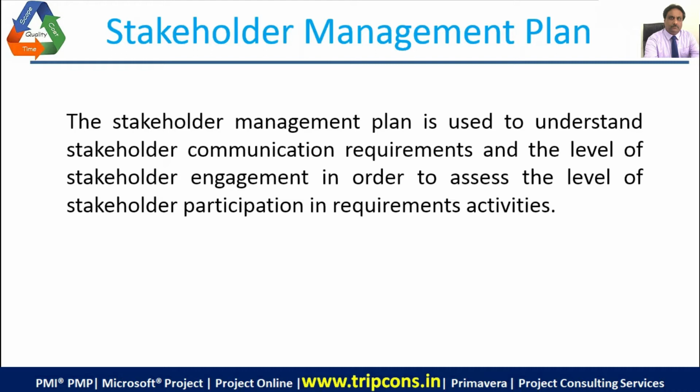You can create it milestone wise also, for milestone 1, milestone 2, milestone 3, and then for the overall product or project. All that can be collected, and you can run the check against the user acceptance test criteria each time you are ready to provide a deliverable.